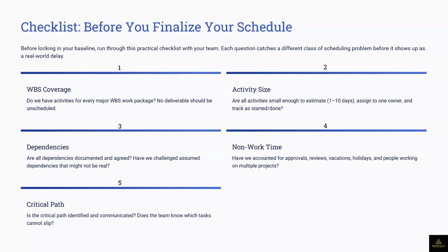There's something called non-working time and working time in the calendar in Microsoft Project and Primavera P6. It takes a bit of time to set up your calendar because it's going to affect things. A calendar could be built with five working days and 2 off days, Saturday and Sunday off, 8 hours work. It could be 5 days with a 12-hour working day. It could be 7 days, a continuous project like most construction projects, 7 days with 12 hours work, or 7 days with 8 hours work. So you cannot use the same calendar for every project.